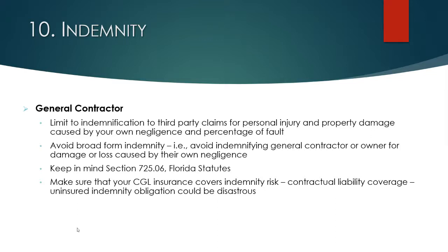Florida does have such a statute, but the way the Florida statute works, which is Florida Statute 725.06, is that those kinds of broad form provisions in a construction contract are unenforceable unless they meet certain requirements. The contract has to have a monetary cap on the indemnity obligation.